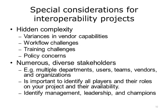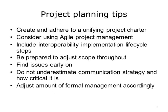For lab orders and results interoperability implementation, the team might include clinician representation, EHR-IT representation for the physician practice, EHR vendor representation, laboratory clinical staff, laboratory IT representation, laboratory information system vendor representation, and interface engine representation. It is very important to identify all the players and their roles, especially project management and leadership. Because there could be many stakeholders, leadership must be clear. A tip for planning an implementation project is to create and adhere to a unifying project charter. Since the project spans departments and organizations, it is especially important to have a shared vision.